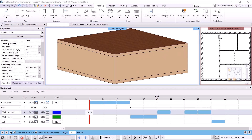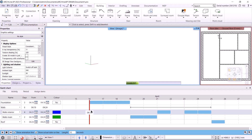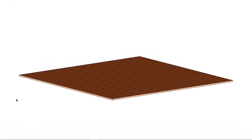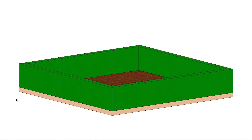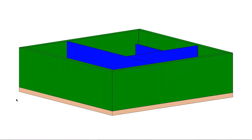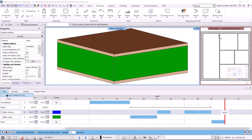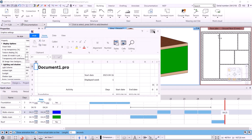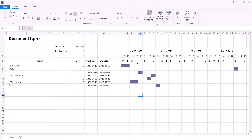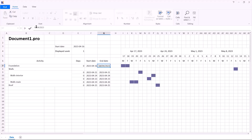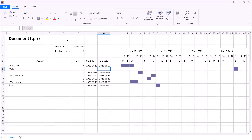We can also save the animation as an AVI file by clicking on the third icon. This may take a few minutes depending on the size of the project. Once completed, the animation opens up and we can see what kind of animation we have created. Let's go back to Archline. Let's take a look at the file menu and select export content to XLS file. This gives us an Excel spreadsheet where we can see the activities and periods. We can modify them here as well — I change the foundation to last until the 19th, thus changing the period length.